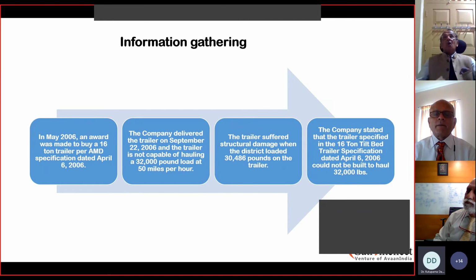We did not have the shipping specification. The shipping specification shows where exactly the skids are and where the center of gravity is; the whole spectrum changes. So we had to take back the trailer and bring the actual trailer the next day according to the shipping specification. In a normal case, we would have been penalized very heavily for delaying the ship. I gave this example to show how important specifications are.